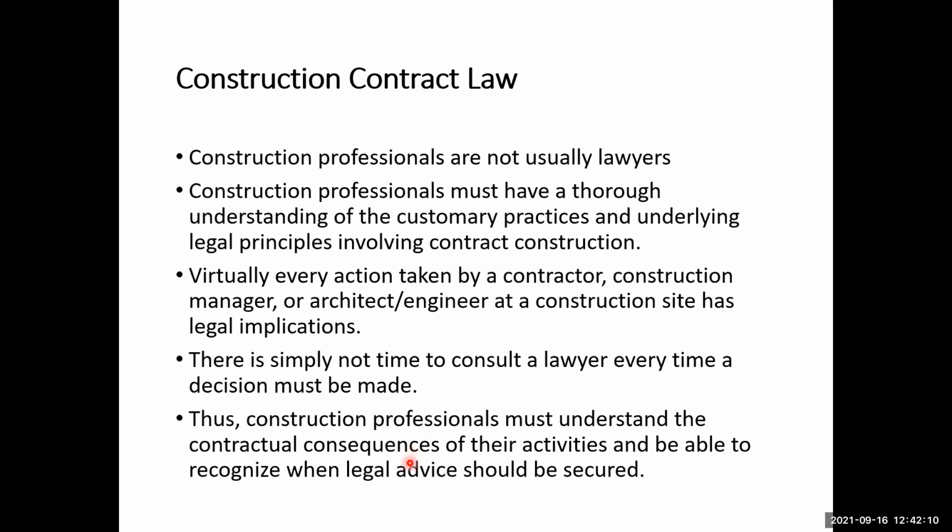So construction professionals must understand the contractual consequences of their activities and be able to recognize when legal advice should be secured. But this does not mean that legal advice from professionals is not required. For very important matters, if things go beyond the control of the project professionals, maybe for disputes, for claims, for important changes in the construction project, legal advice is also needed.